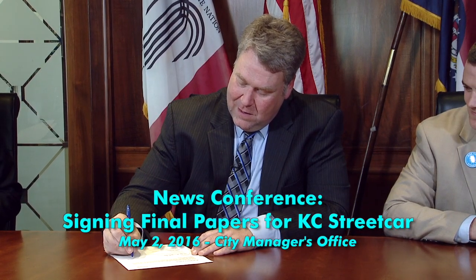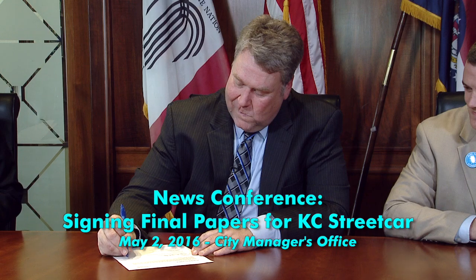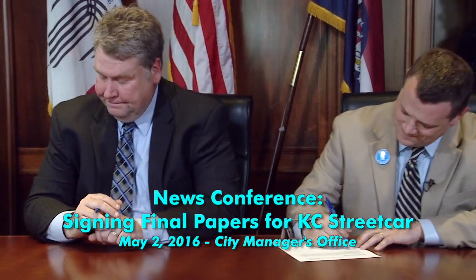The next document is the Safety and Security Certification Verification Report, or commonly referred to as the SSCVR. It's actually the signature page out of a summary report where we've summarized all the different testing and training that we've done in preparation for passenger service. Tom? And last but not least is our cover letter for the SSCVR, in which we formally submit the SSCVR and also request to open for passenger service on May 6th. Great.